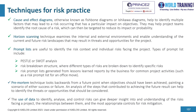There is also the pre-mortem technique, which looks backwards from a future point when objectives should have been achieved, painting a scenario of either success or failure. An analysis of the steps that contributed to achieving the future result can help identify the threats or opportunities that should be considered. Additionally, the use of data to identify, analyze, and control risks can give deeper insight into understanding the risks facing a project, the relationships between them, and the most appropriate controls for risk mitigation.